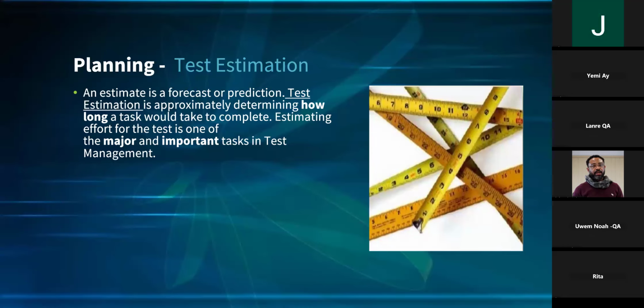So how do you do the estimation? Take an example. You've written maybe 200 or 1K test cases. You're 4 in the team. You want to give an estimation. Okay, from your end, how many can each of us do? Maybe 30 in a day, or 40 in a day, or 20 in a day. For the next 2 weeks, you count things like that. That's the way you look for the way to do your test estimation.